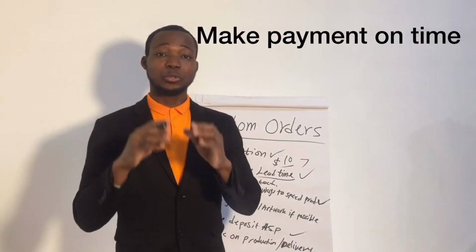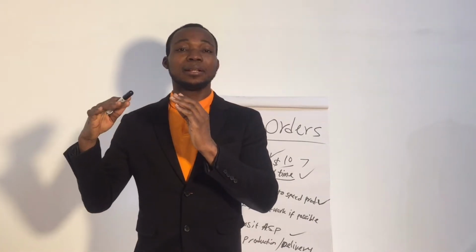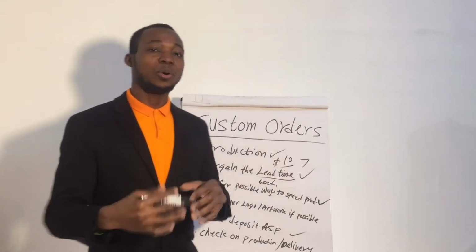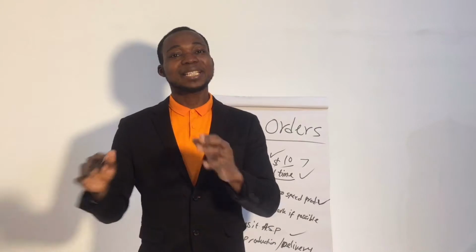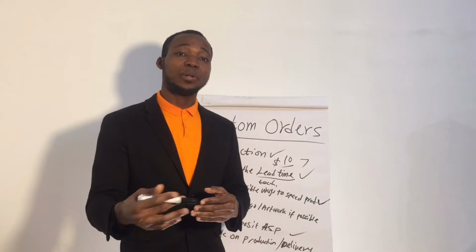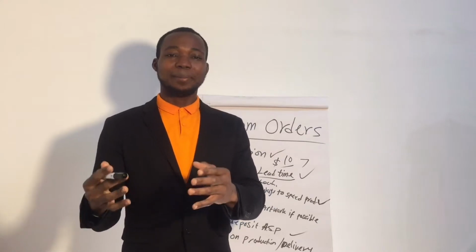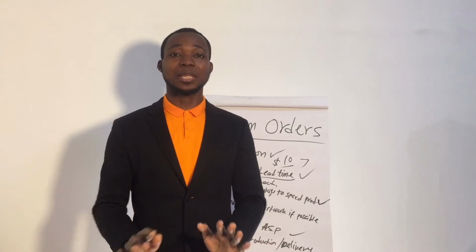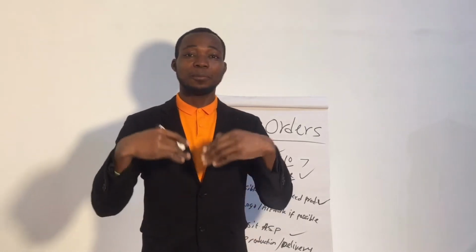Every company that you want to work with or produce from, be it online or in the city or in the town or country you live, or in a foreign country, the delivery time or production time starts from the day you make your deposit. I know some factories produce without deposits, which is not popular. But if you are lucky to meet a company that can produce for you, and after production you pay, that is totally different from what I'm talking about. What I'm talking about here is the case where you need to deposit money before production starts.